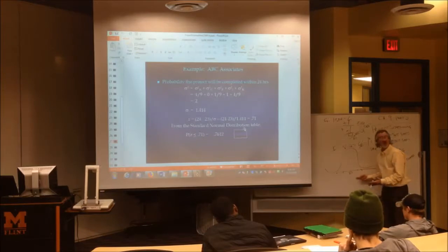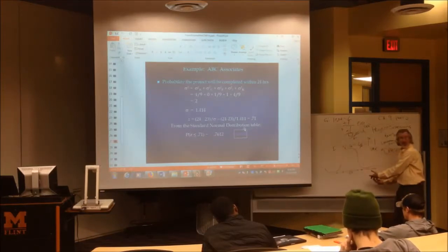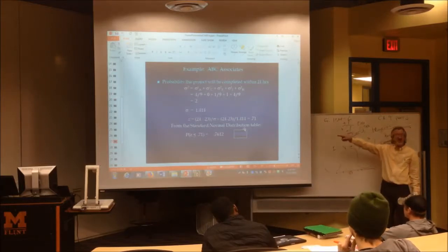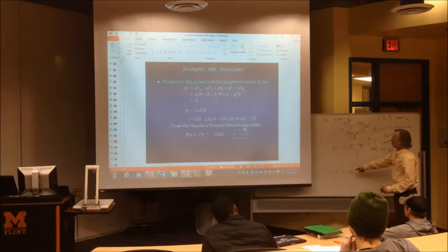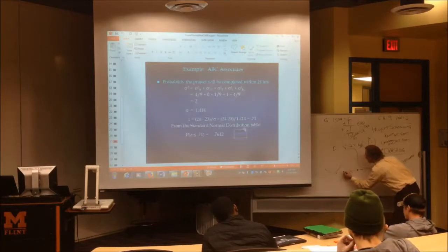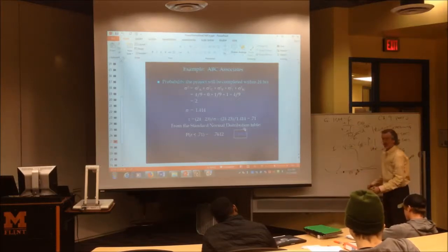And this is just a number line. The numbers to the left will be smaller, the numbers to the right will be bigger. It's just a matter of which numbers you put in these dashes, and it's all based on that standard deviation. So 23 plus 1.414 would make this one. This would be 24.414. And somebody's got to calculate.